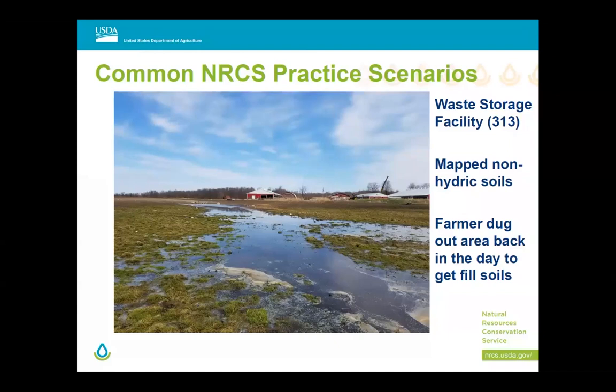And then if the scale of a project is so great that it might require an individual permitting process, that becomes a whole entire different thing, where one might be required to look at every single piece of land that the landowner owns who wants to do a project, and they need to prove that there was no other way and no other land that they had that they could do a certain activity. So typically we're dealing with the general permits, and you need to be aware of the square footage thresholds in your area. And oftentimes our engineers are particularly clued into that because they're very involved in the permitting process as well. There was a confirmation that, yes, indeed, it was about the general permit.